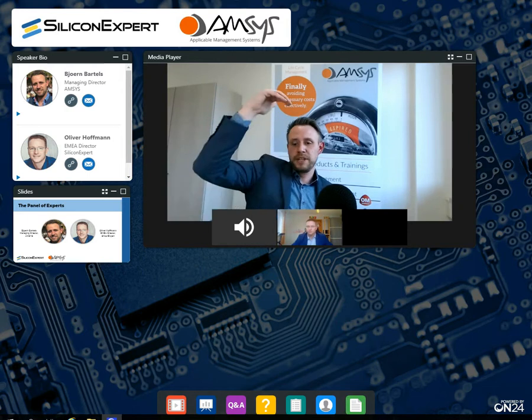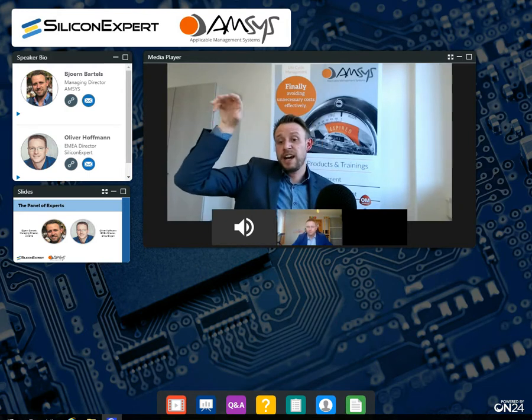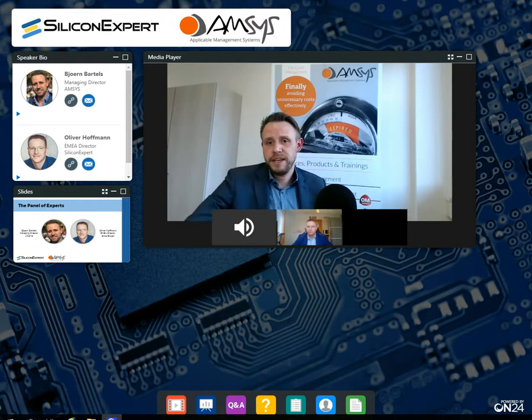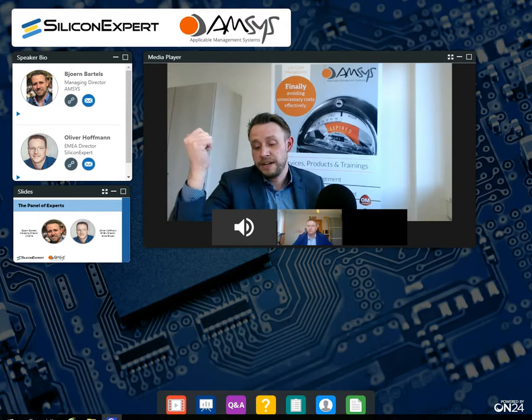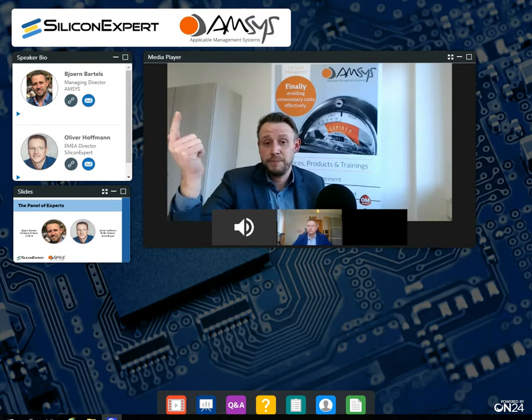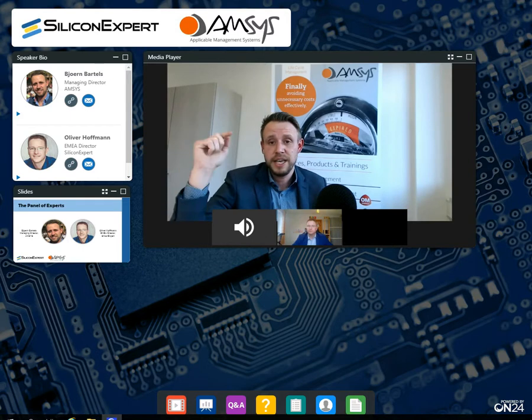So I have to look up a little at my configuration and then look down again. Are there other items in my configuration that are as well in NR&D? What are their forecasts? Are there maybe even obsolete items in my system? Because you don't want to waste engineering resources on designing out one single component out of your overall configuration. What you really want to do is dedicate the resources to design out already obsolete components that have not a good forecast, so that they might be on high risk,